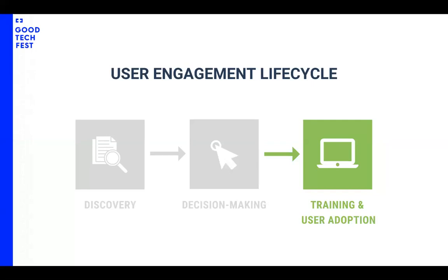They get to stop and just think through the product, test it, provide feedback without, you know, having a noisy, busy schedule, and give the feedback before we deploy the solution and go live. And it has also been very beneficial to give the teams a lot of time to practice in a test environment before going live within every phase.